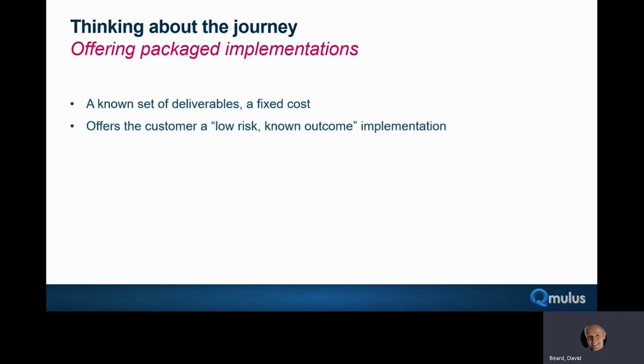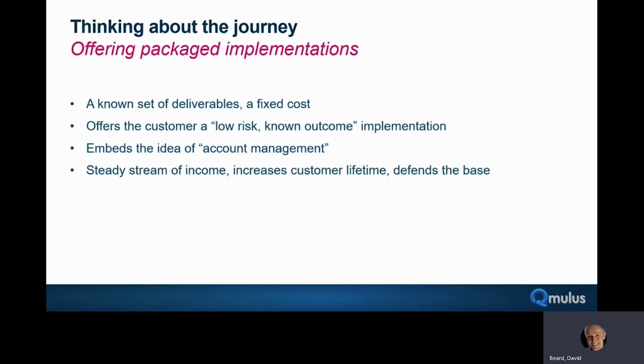Danny, as I mentioned earlier, will be talking a bit about Sage CRM deployment in 357, as he's called it. I would also make the same point that offering packaged implementations is particularly important. Why? Because packaging a story, be it for a team, be it for a phase, be it for a certain set of modules, makes the delivery known, and hopefully at a fixed cost as well. Because you, as a customer, of course, you want to know that you're going to pay a certain amount of money and receive a certain set of feature or functionality back.